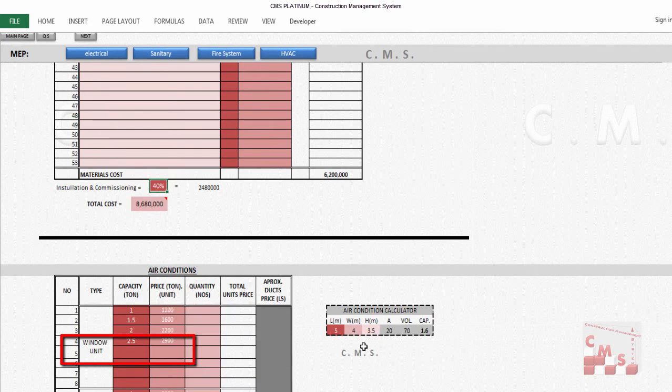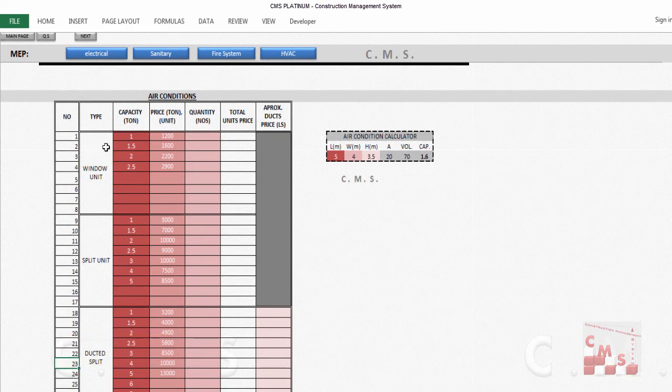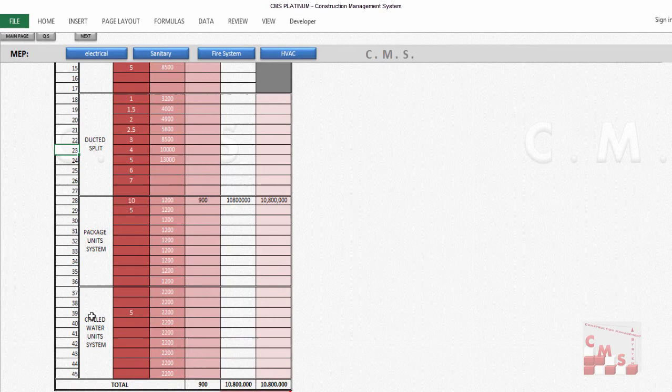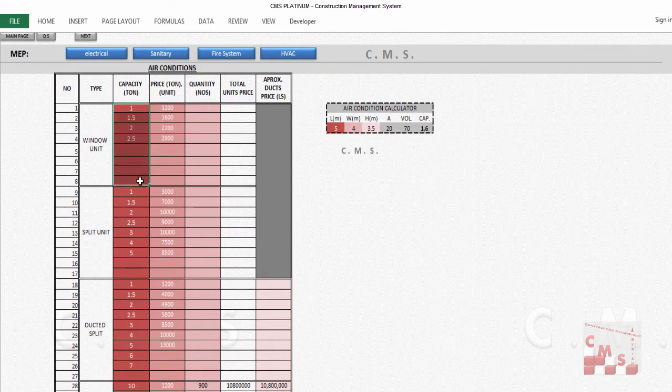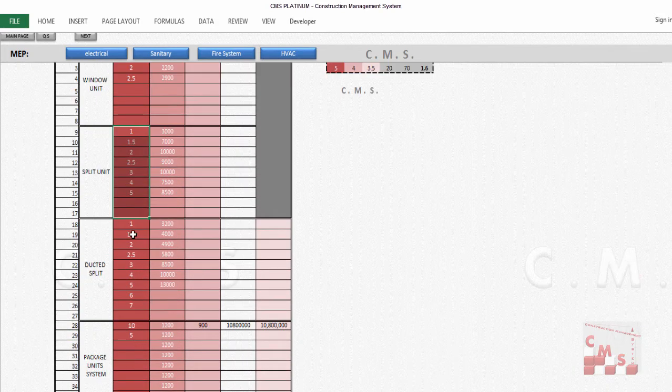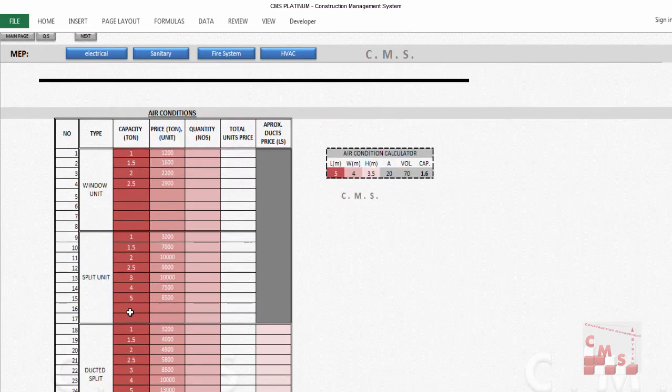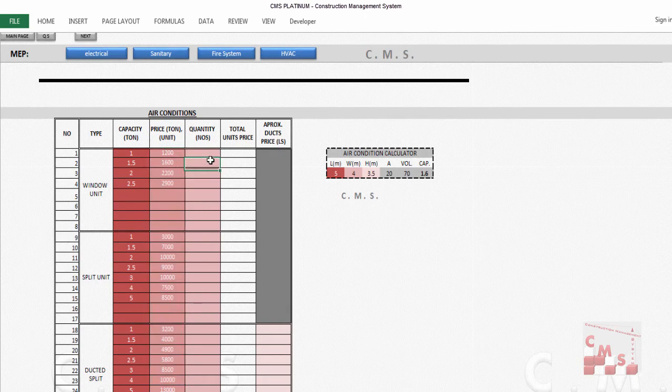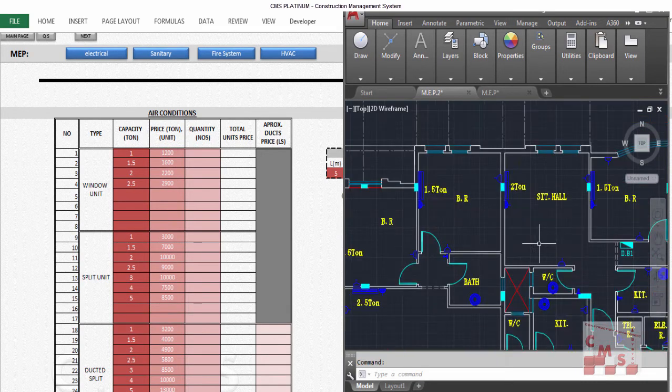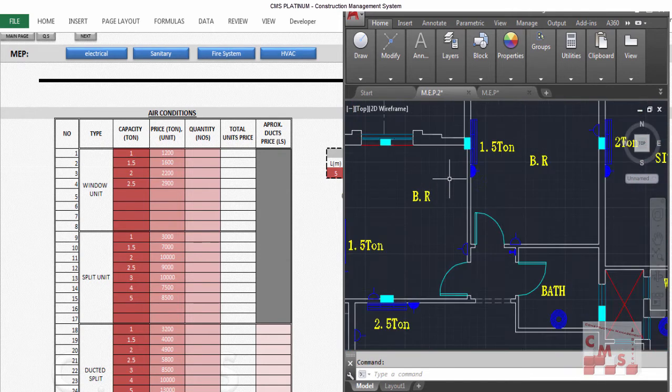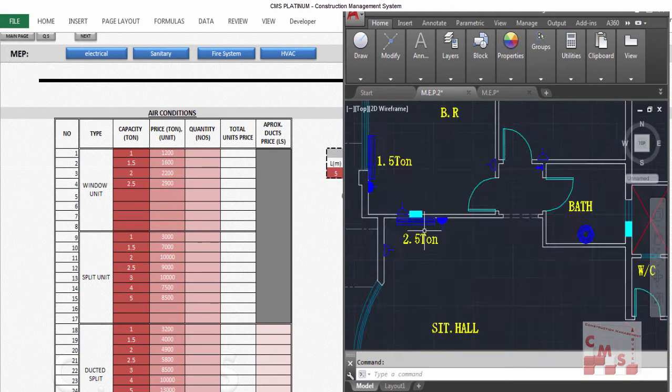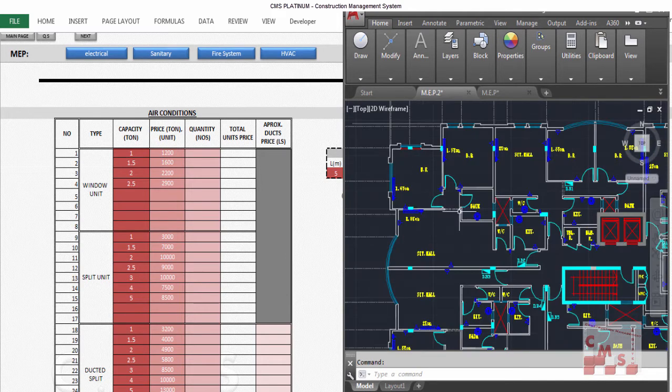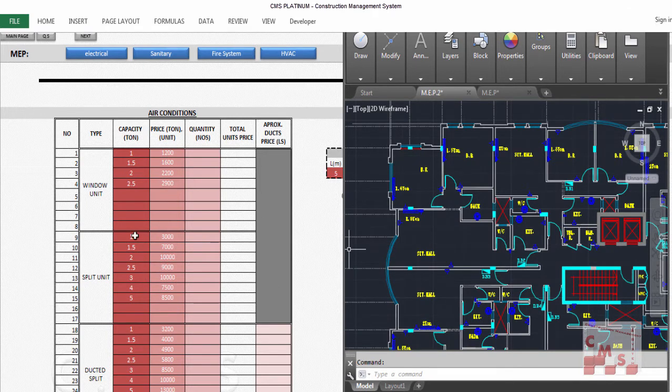Same also for the AC, the air conditioning or HVAC. That's the common types of AC used in construction. Insert here the capacity for each type and the price per ton for each type, and the quantities from the drawing. According to the drawing, you can count all the numbers of AC with each ton. We have here two ton, one and a half ton, and two and a half ton, so you count each capacity separately and put the numbers. If you're talking about the split unit, you'll put the numbers here directly.